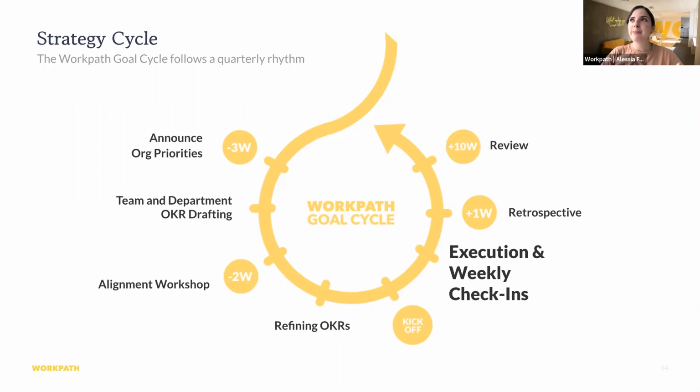So let's imagine a Scrum team works together with a waterfall team and they need something from that waterfall team. Then the Scrum team should tell them, we probably need your contribution by the end of our third sprint. Then you should tell them when that is and give them just the deadline. Sometimes we need to be a bit user-centric and customer-centric in the communication with the other teams as well, right? Think about how I can explain to them when I need something from them, and how I can make sure that I actually get it.